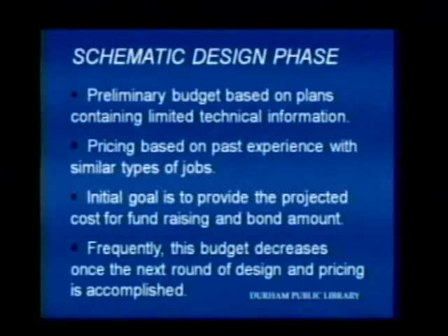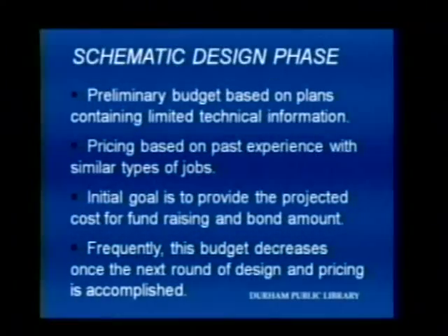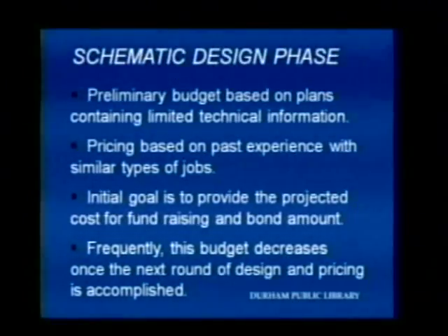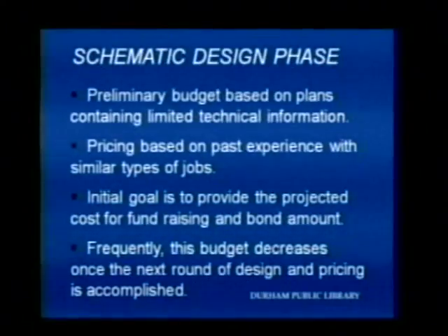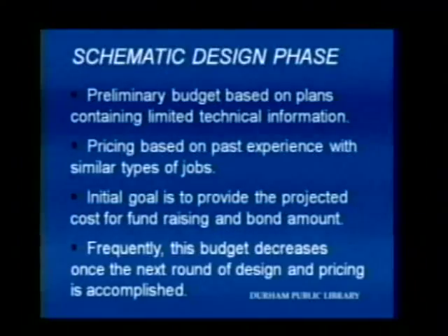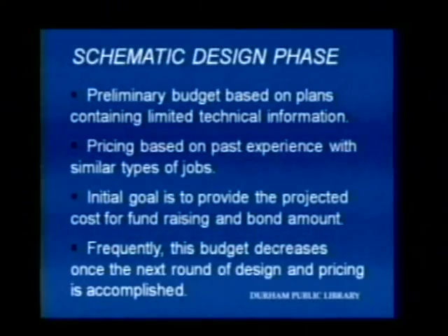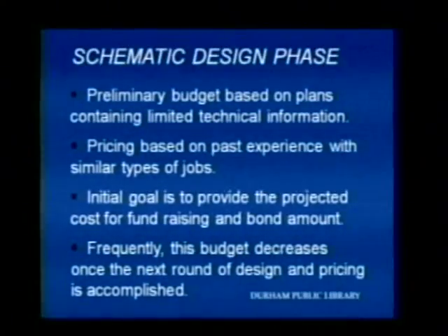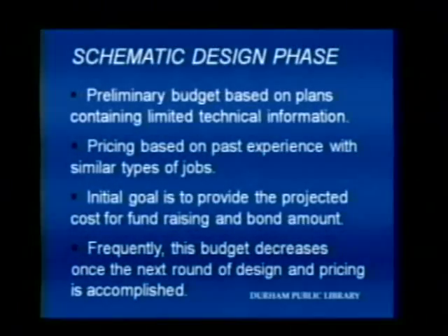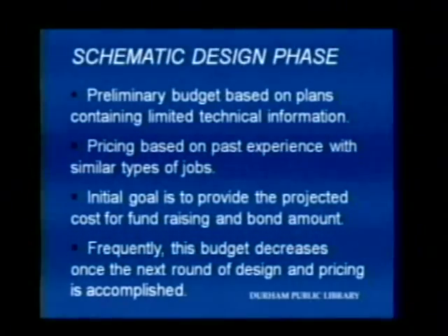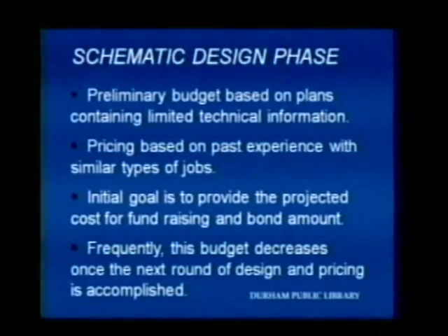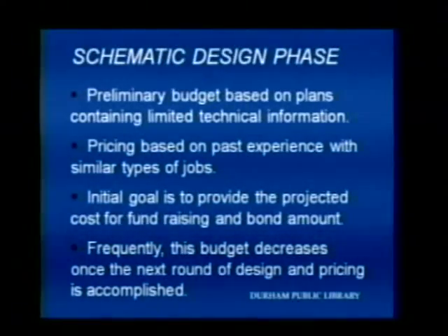Frequently, when we go through the later processes, our estimates will be lower. But we're trying to project potential construction industry increases and all the things that happen in the construction world. And I've been at this for almost 35 years, and it's a very volatile industry. And so we try to make sure that we don't create any difficulties for the communities by estimating too low.